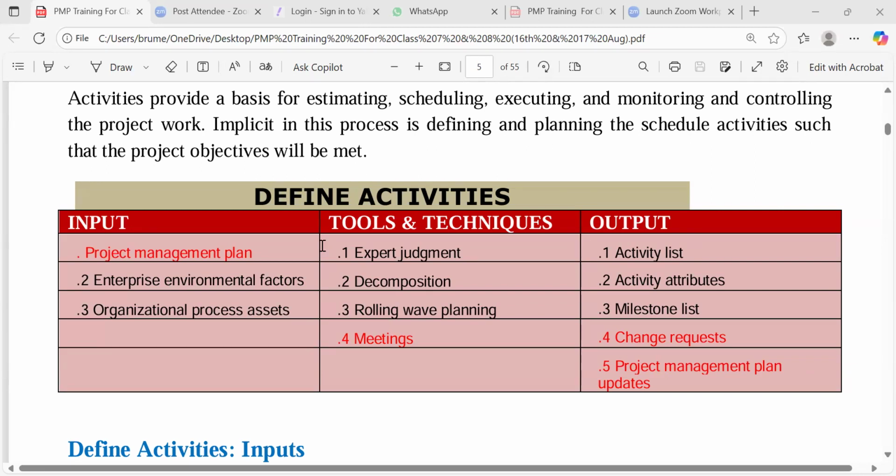Having said that, the rolling wave planning that I explained is showing up here. Rolling wave planning is when some aspect of our work may not be clear enough for us to plan. So we just plan as much as we can see and start working on it, and as we work, we become sure of the next level, because we cannot see things clearer yet.